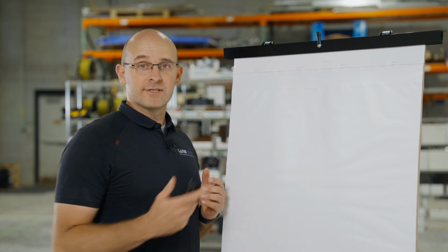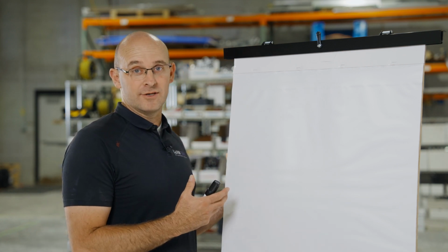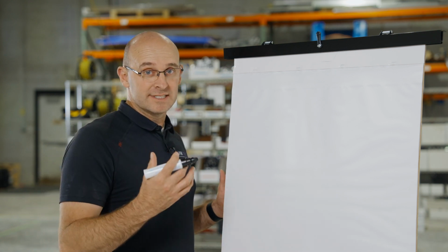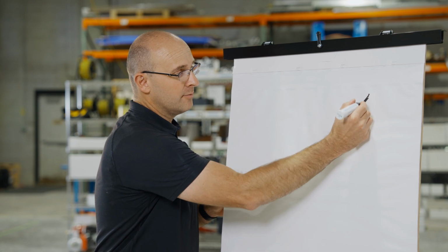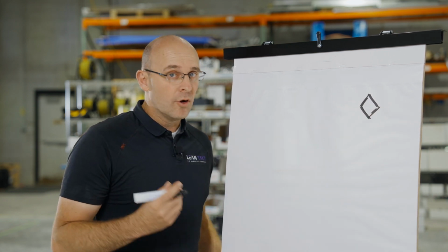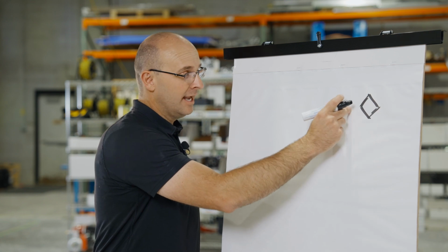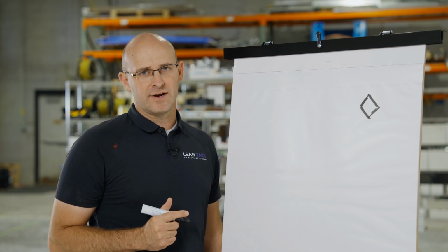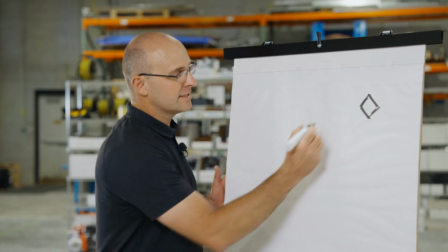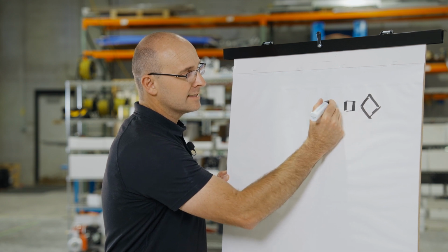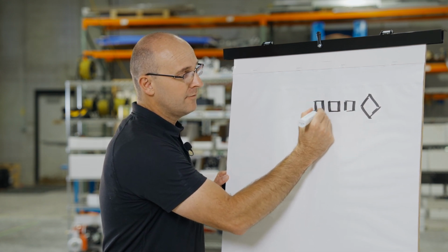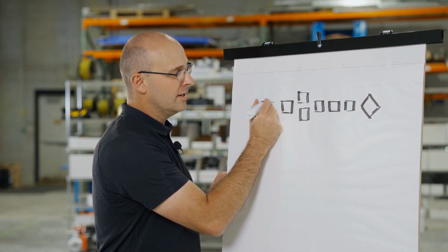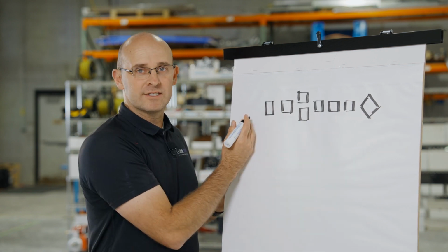All right, so you knew I was going to head over here to our easel and the post-it notes, right? I just love drawing. So the way I like to visualize a pull plan is specifically like this. If you have a milestone to which you want to pull, or what I mean is, if you have a deadline and you need to know the sequence to get to that point, what we're going to do is identify that milestone, and then, this is how I like to visualize it, we create that sequence most of the time, if you're doing it physically in person, with little sticky notes, or if you're using a software, that's fine too, but you create a sequence of activities.